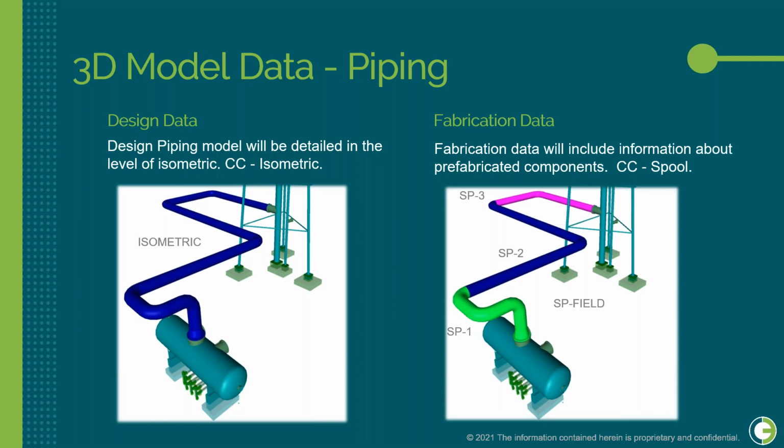Definitely, these construction components seamlessly link to their bill of materials, drawings, specification documents, etc., based on their purpose. In addition to that, resource status checking, constraints, and execution tasks based on the construction purpose will be automatically wired to it. You can see on the right side of the image, the construction component is a spool. Workface planner can select spools and add them to the installation work packages.